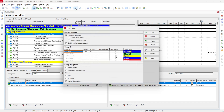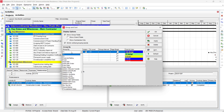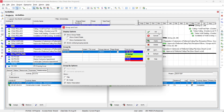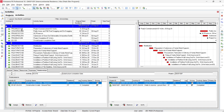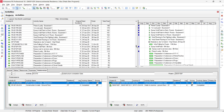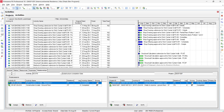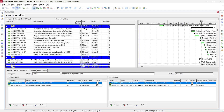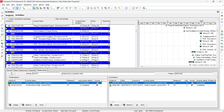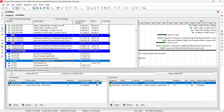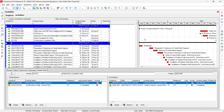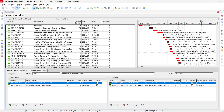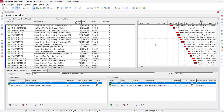To display the float paths on screen, go to Group and Sort, select 'Float Path', and click Apply. You can see the first float path, and scrolling down shows up to 264 float paths calculated out of the 300 paths specified. Since many activities are still not on any path, you could increase to 1,000 paths. The project activities are now sorted by float path.